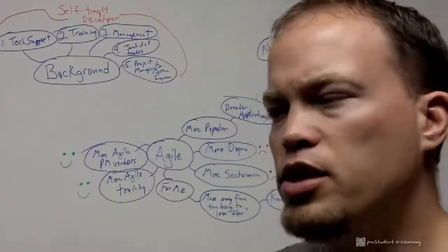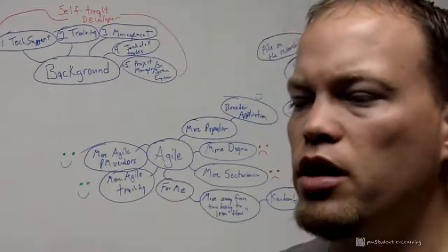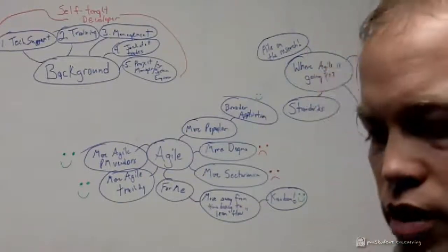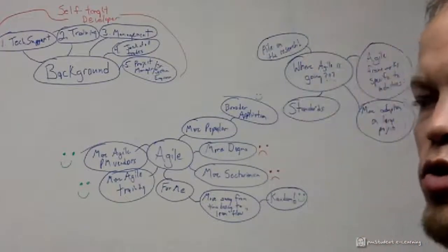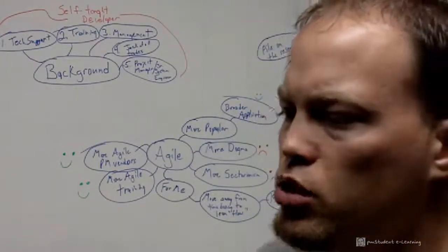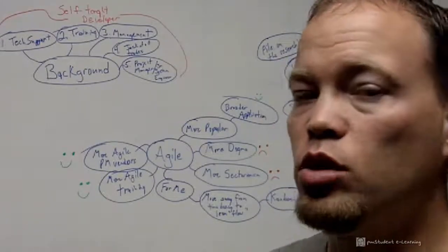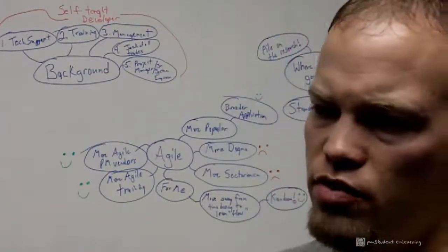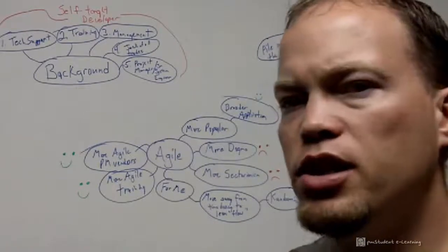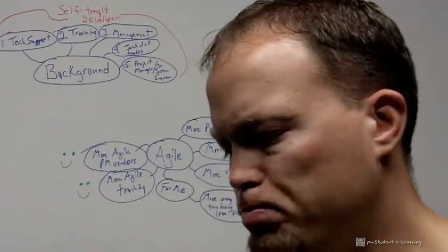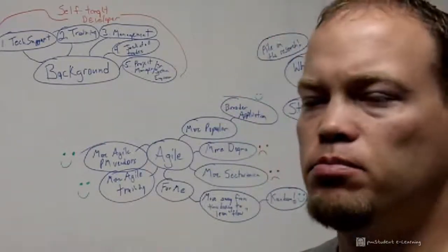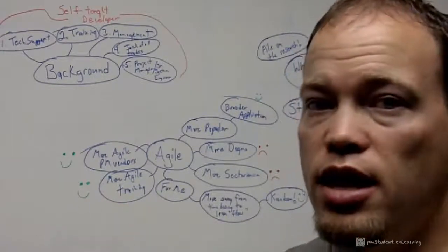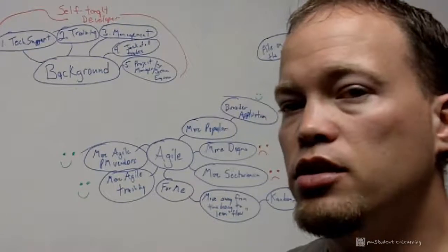And I'm seeing a lot of papers being written, presentations being done on doing Agile in large government projects, doing Agile on large projects where you have things like Scrum of Scrums and other techniques for still having the small team that you really need to make Agile work properly. For my money, you usually don't want to go beyond 10 people, and some people say you can go up to 14 or so, but once you start getting beyond that 10 range, it gets kind of difficult to manage. So I think more and more we're going to have large implementations of Agile coming to the fore, and again, hopefully more research on that and more case studies of those being successfully implemented.